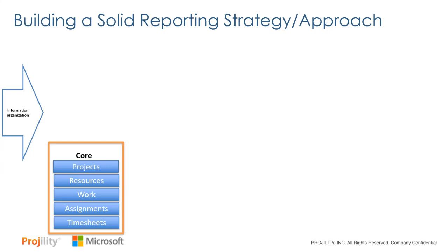For instance, if I assign Sarah to a task that goes over 5 days, an assignment is going to cover all 5 of those days. I'm going to have a Monday assignment, Tuesday, Wednesday, Thursday, Friday. So it's 5 assignments. And you can imagine if you have 600 or 800 people in your IT group and you're creating detailed assignments and they're going to timesheets, that could easily add up to tens of thousands, almost millions of records over a period of time. So that's a very, very large data set. They're going to have to think about how I'm going to manage and report off that.